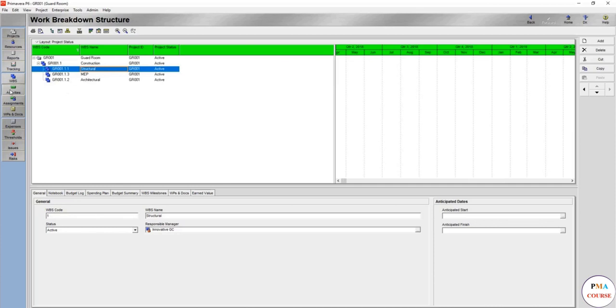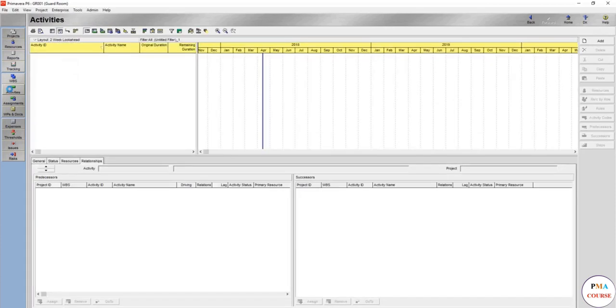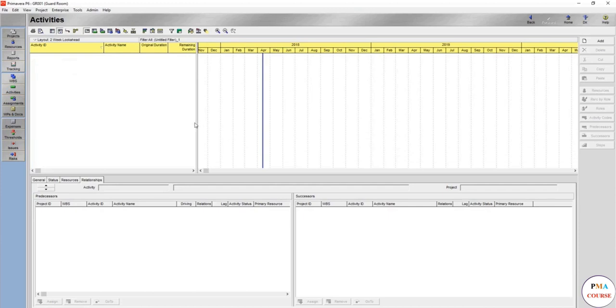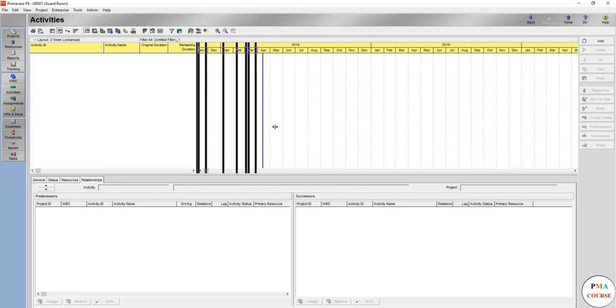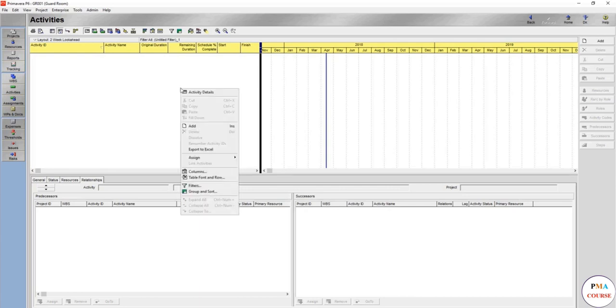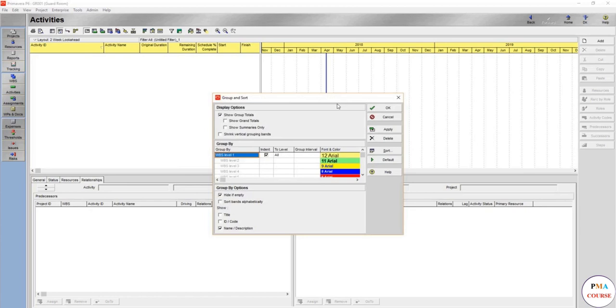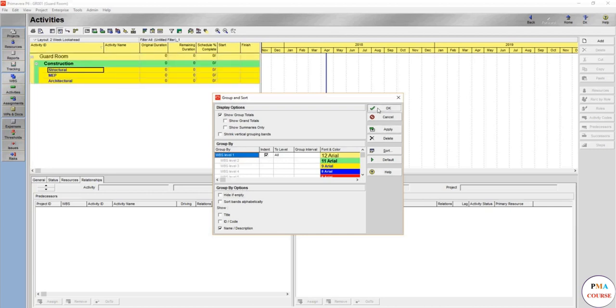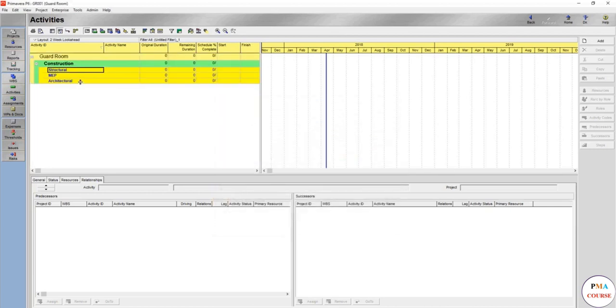So let's move to the activities tab. In the activities tab it seems there's nothing, even the WBS you have just created doesn't appear here. So how to show it? Just right click anywhere then group and sort. Anywhere here, not in the bar chart. Here as you see, hide if empty - this talks about the WBS.